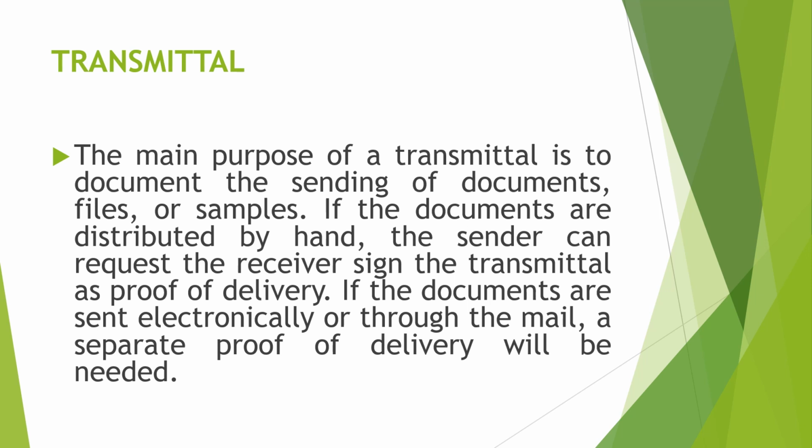If the documents are distributed by hand, the sender can request the receiver sign the transmittal as proof of delivery. If the documents are sent electronically or through the mail, a separate proof of delivery will be needed.